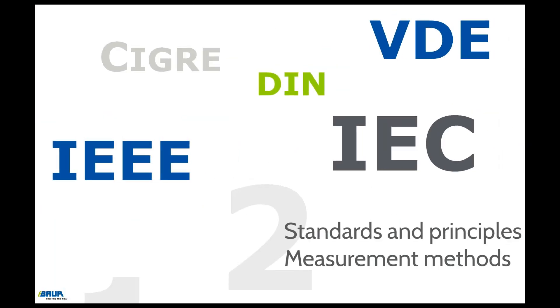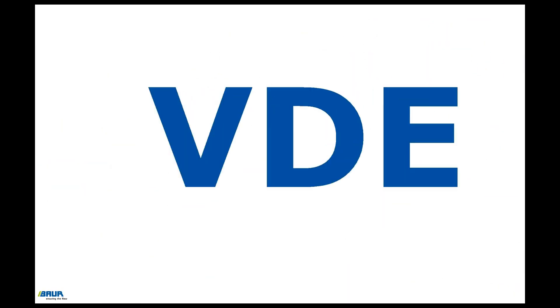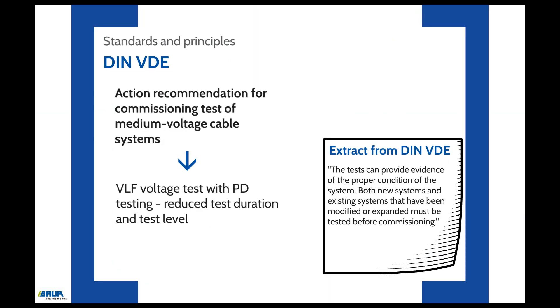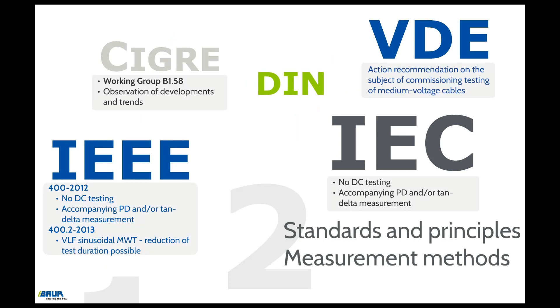The committee of CIGRE has also set up a working group on the subject of cable diagnostics in the medium voltage range, thereby assigning more importance to this area. The DIN VDE recommendation for commissioning testing of medium voltage cables includes a VLF voltage test with accompanying PD testing that permits a reduction in the test level and test duration. In summary, all the listed standards include and recommend TAN-delta and/or partial discharge testing to accompany the voltage test.